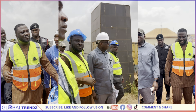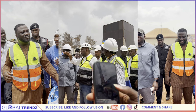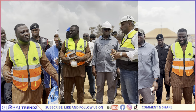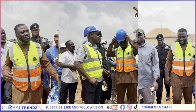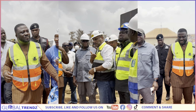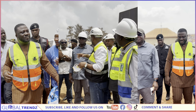Dennis, where do you want us to go? The average of the limit is around 28 meters down. The diameter is 1.2. So now we start from pier number 14 going to number 2. But we can't go ahead with full power because of the water lines still live there.